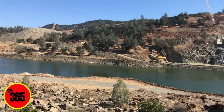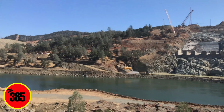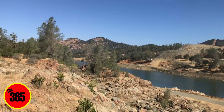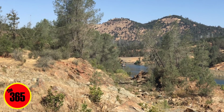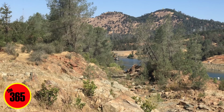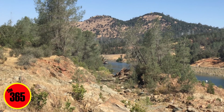They're pulling and dredging the bottom of this and removing as much material as we can. Chris, you're going to zoom over and you'll be able to see just at the edge of our view, we can see there's a couple of barges, and there's an excavator on those barges, and they're removing material. They're putting it on a barge that just is made to ferry the material to the shore, and then they offload it and they bring it back out.